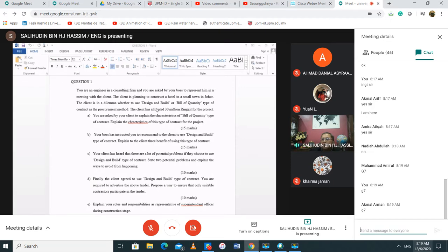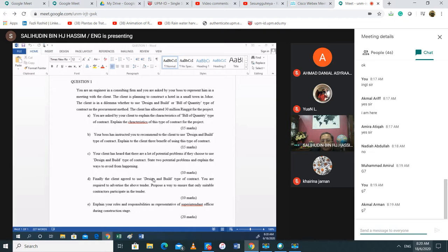Second thing, it is a hotel. So we have to call the contractor with head and subhead of hotel. And the thing is designed a bit. So the contractor must, even though they appoint the consultant, they must have the right group of engineers who can deal with the consultant also. Of course. And then you have to see the track record. You must mention there which track record of building hotel at least. Similar. Of course, the others you can come in and add on. This is a trick. But a lot of you never thought that. Is you must have that one in the condition so that only suitable contractor participate. Otherwise, all team Tom, Dick, and Harry will come in.